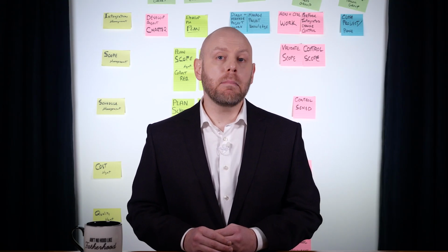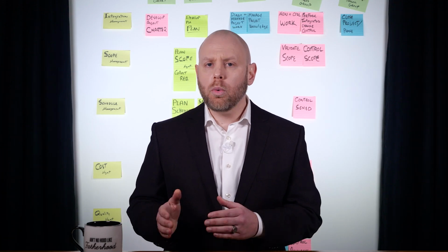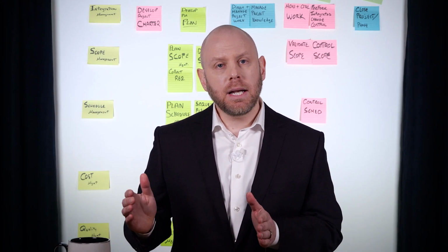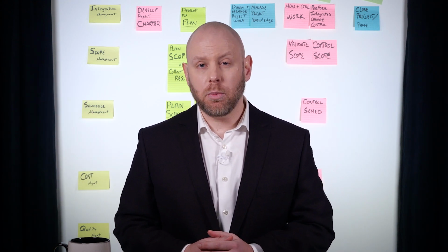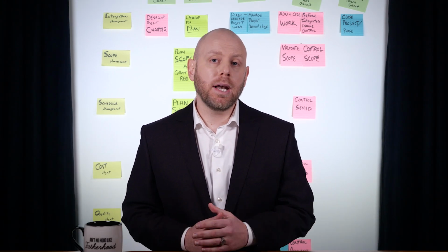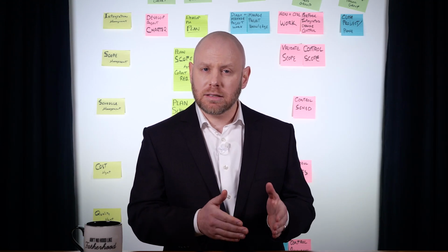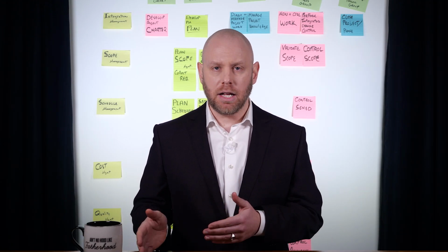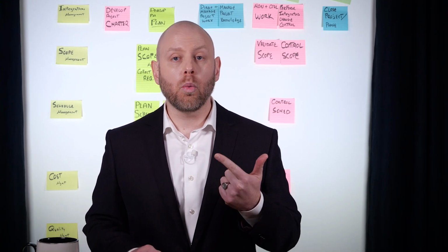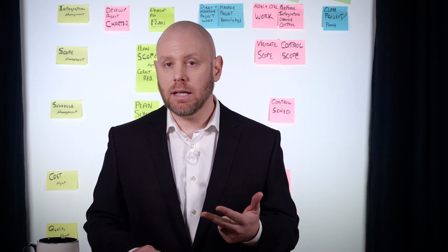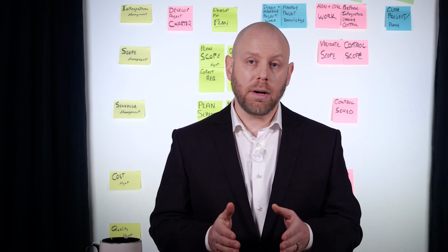Bottom-up estimating is a method of breaking down the cost of the individual components or lower levels of a WBS. By estimating the duration of the component work, the whole project can be estimated with a reasonable level of confidence. Three-point estimating is a combination method of estimating that incorporates risk by combining three different values: an optimistic or best case with a pessimistic or worst case and a most likely scenario. A three-point average can be reached when dividing their total by 3.